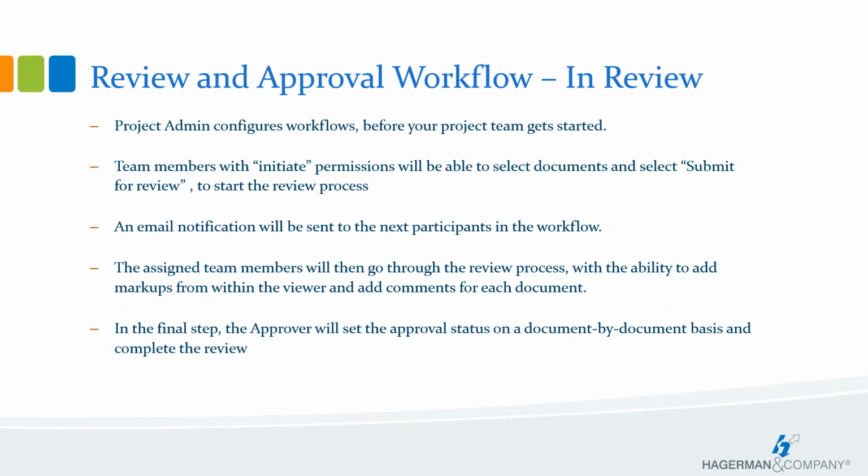In all cases, the documents will remain in the original folder with the approval status displayed. Depending upon the configuration set up by the project admin, the additional action in which the approved documents are copied can occur. That has to, again, be set up by that project admin.